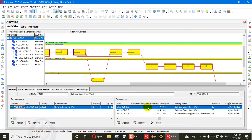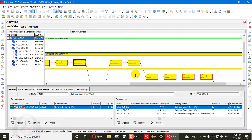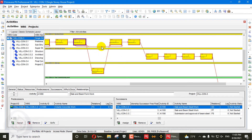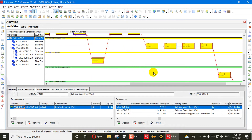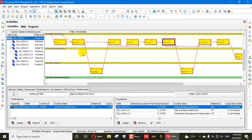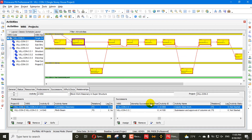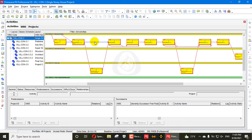Slab beam steel work has a successor free float of one and three days. This activity is not even driving, so these activities are not driving — meaning this relationship is redundant. There is another redundant relationship here: you can see a relationship free float of two days here, and the column steel work activity is redundant to this successor. You can see this successor relationship is redundant, and also start-to-start and finish-to-finish both are redundant.